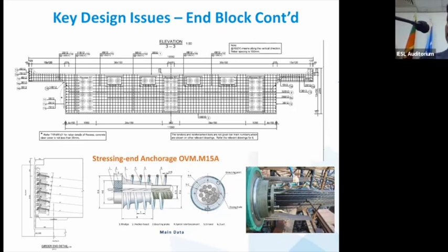That's the benefit of having ECI, early contractor involvement, because some projects give the opportunity to talk to the contractor. The contractor has the opportunity to talk to their preferred supplier, right? When you get the preferred supplier, then you get the product. Then you check whether that product fits here. This is what we did here. And then thankfully, 100% sure this will fit. And I know we talked so much about it, otherwise it would be a catastrophic failure.